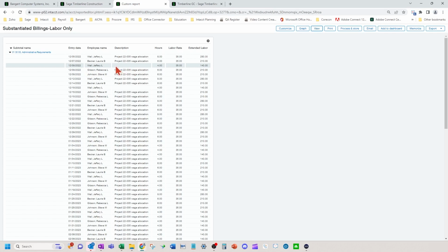So worked on floor 1, punch list items, whatever can go right there. On those timesheet entries, they could flow through to here. So that's generally what this description column usually shows. Then you have your hours that they put on their timesheet, what you set for the rate for the specific project, and then this extended labor would be your hours times your rate.